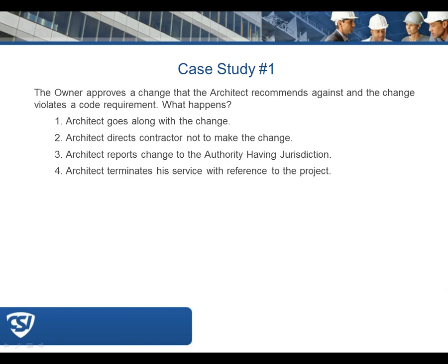I actually had this situation arise on a project fairly recently where the owner wanted to add, I guess I can say this without getting in too much trouble, so the folks that know me and are from our firm will recognize this, the owner wanted to add some additional paving to the site work that would have exceeded the impervious surface requirements. And again, in North Carolina, there are requirements that if you have so many square feet of land that you're building on, there's a limitation as to how much of it you can cover with impervious surface.